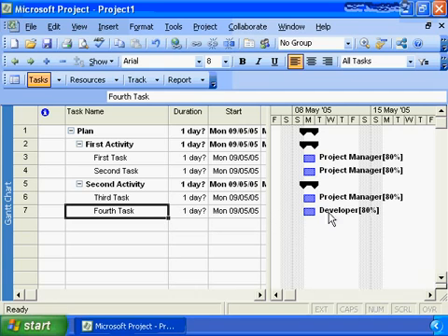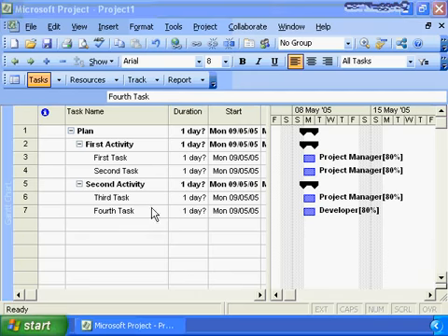You will note Microsoft Project does not automatically schedule the work based on resource assignments. We can ask it to, but it does not do so automatically, and we will get to the scheduling options in just a few minutes in this nugget. So at this point, we've done the first 3 of the 4 tasks associated with creating our project plan. We developed our work breakdown structure. We added our resources to the Microsoft Project plan, and then we assigned the resources to specific task elements.